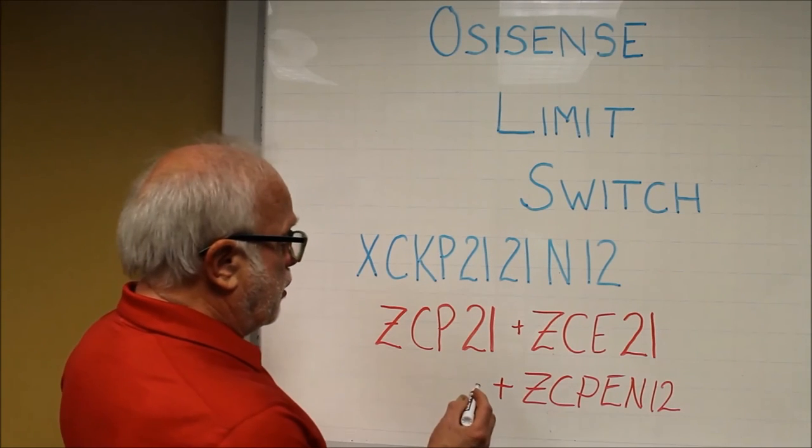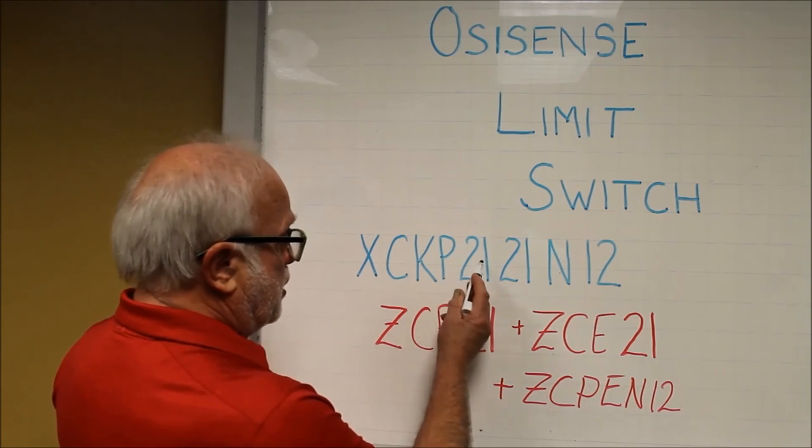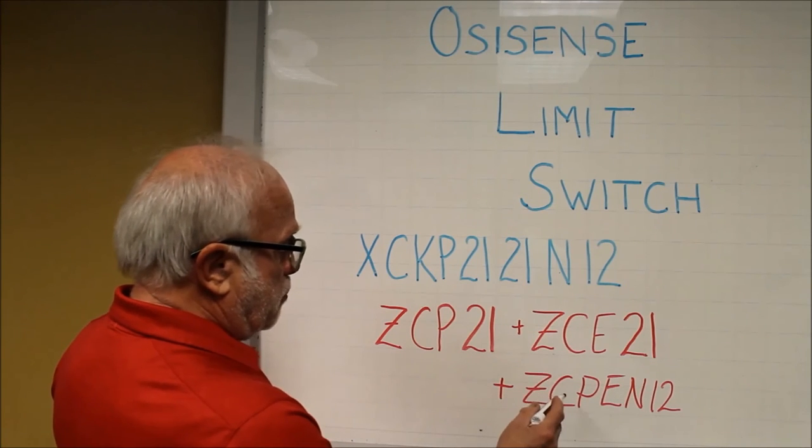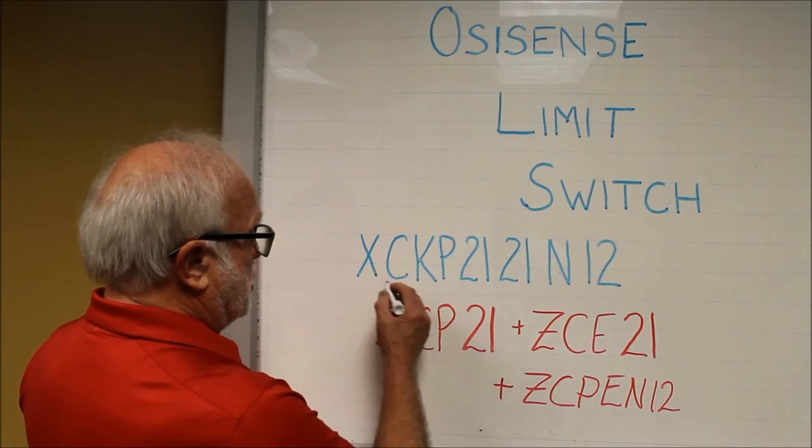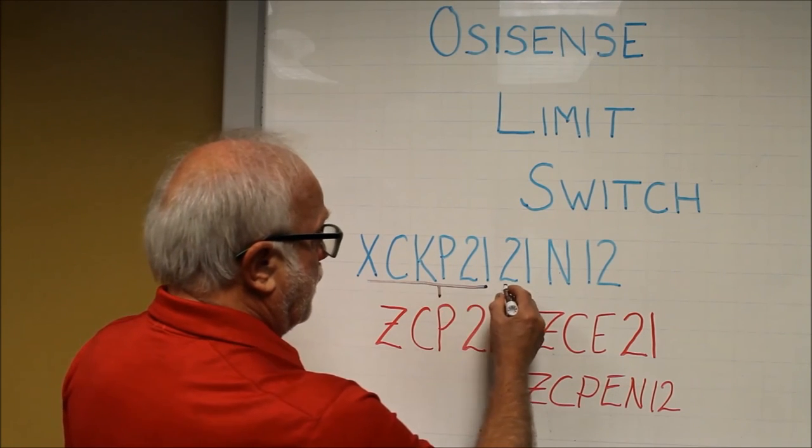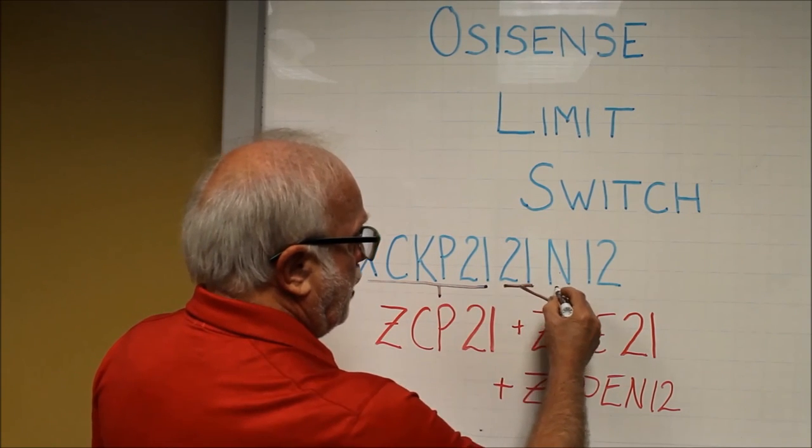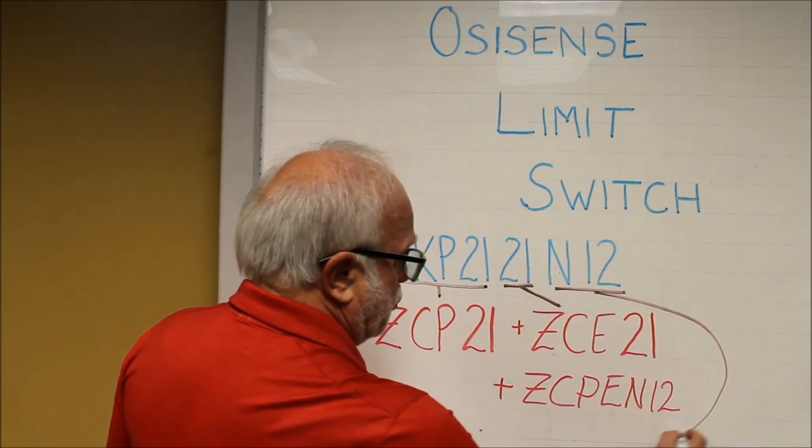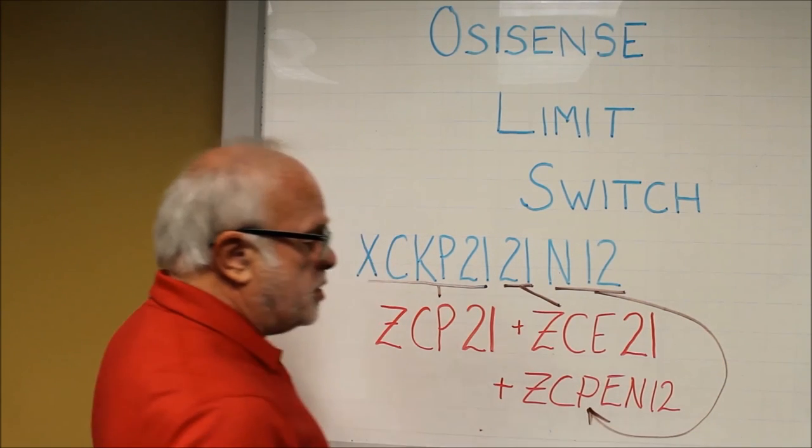So if we cannot get the switch as a complete assembly, we can specify components which may have a shorter lead time. We have the switch body, we have the switch head, and of course, we have the conduit entry. This completes the assembly.